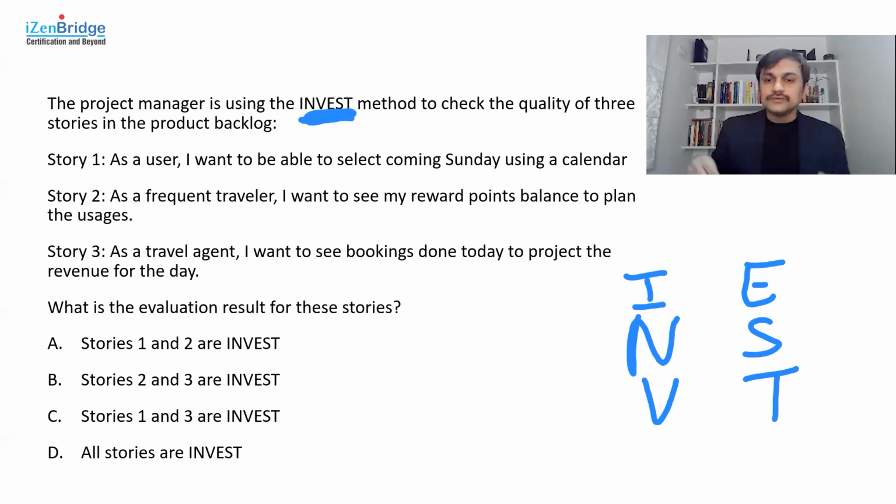So a set of your project team, which is developing it, they come together and estimate the user story, and they need to have their definition of small, which means it should fit in a given iteration. Now, just by looking at these user stories, it might be very difficult to talk about estimatable, small, and all the elements, because they are very specific to a particular team. But we can identify, from looking at it, which ones are the good user stories.